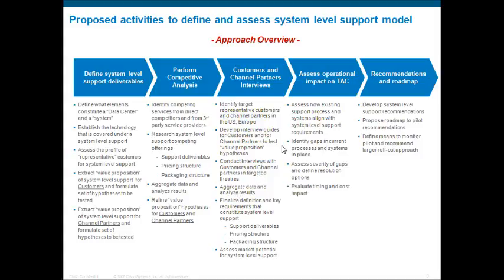This should be fairly straightforward for you guys, if you've done any kind of work planning effort, right? But this is just a way to communicate. We call this the chevron approach, right? You come up with the 5, 6, 7 major buckets and the sub-buckets. If you were to blow this out into a Microsoft Project plan, these sub-bullets probably have another 5, 10, 20 bullets underneath those, but you're not going to communicate all of that to a client in an executive fashion, right?